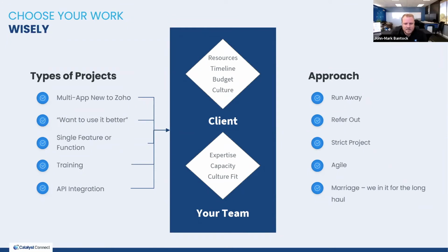Yeah, and I think that being upfront about your confidence level on different aspects is hugely important, and that's something that we point out now in our project plans: what do we have a lock on, and what is going to be fairly easy to do.